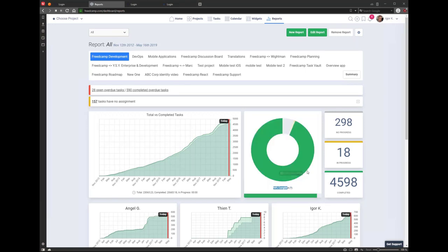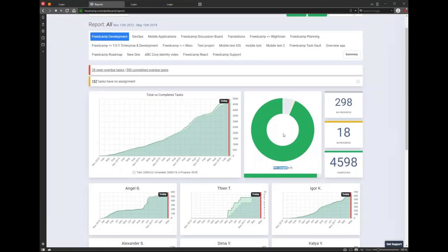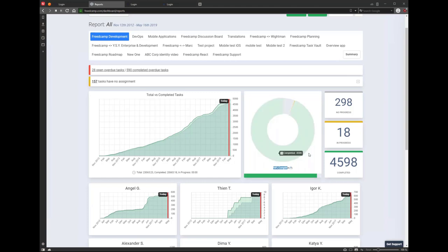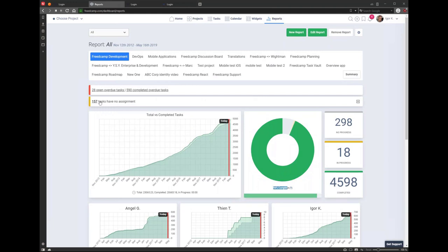The completion percentage is no longer just completed tasks versus not completed. In a project, you can have one task taking one day and another taking nine days. If the one-day task is completed, the project is clearly not 50% done because the other task is nine times longer. So it actually calculates based on the duration of tasks. As long as you use start dates and due dates for tasks, it will be much more accurate.